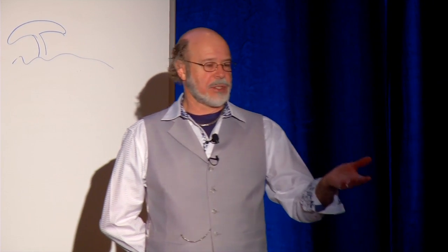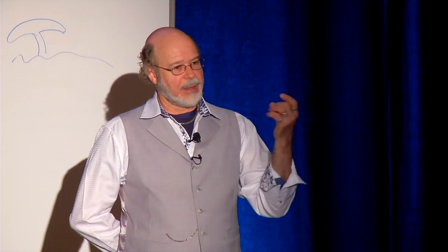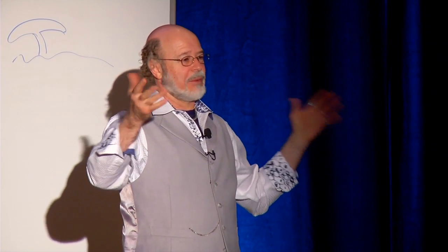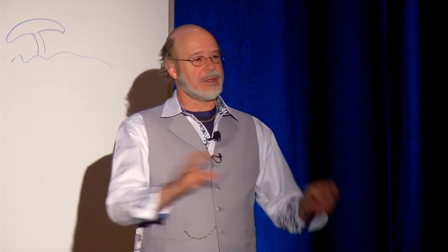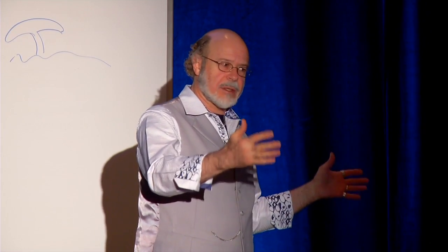And so when the project architect comes to me for his checklist, I'm also talking to them about what kind of scope we are doing here, and if something seems a little fishy, like, wow, we're working in an existing building and we're going to retain the facade and nothing else, oh, okay, that's a little bit severe. So I'll go back to the project manager and say, what are you putting in for time? It's going to be a little more complex. Do you have a specialized consultant that's going to work on this, or are we going to do it ourselves?